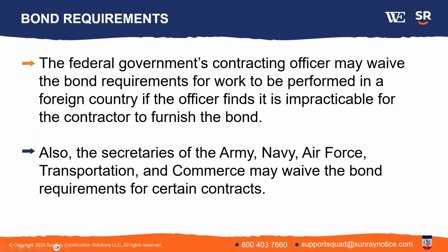Next slide. This is an exception that probably doesn't apply much to practices in this area, but the federal government can waive the bond requirements if it's a project in a foreign country, if it's impractical to do so. And for certain contracts, the secretaries of the Army, Navy, Air Force, Transportation, and Commerce can waive bond requirements. So again, you're going to have to see what their policies are on that, but they have the authority to do that in certain circumstances.